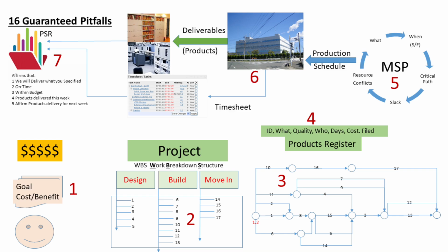Guaranteed. And number 6. The project team resources doing the work are a mixture of your own team plus external consultants. Your team is already busy helping to run the company, and the consultants are also busy helping other organizations as well as your own. Quite a recipe for delays. If this sounds familiar, don't be surprised, this is a widespread problem.